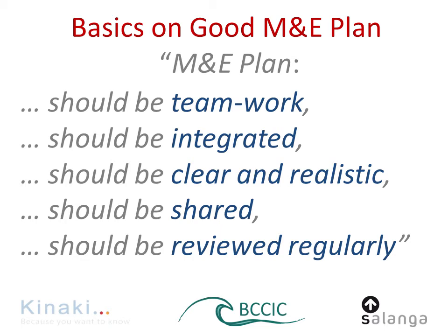Now, that depends on the scope and the time frame of the project. It could be quarterly, it could be annually, or for longer projects it can be less often than that. But assigning a time when the whole team actually meets, and it could be a team in the field and a team in Canada as well, or elsewhere, will actually help you to keep the M&E plan updated and relevant.